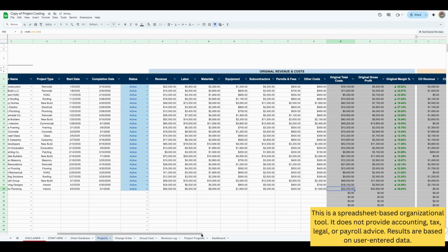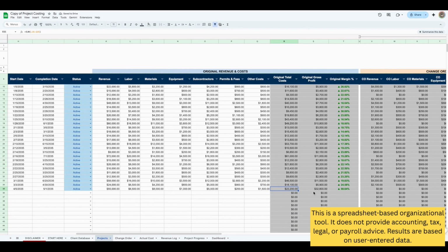So we can see here the gray area automatically calculates this information. So you can see here the budgeted cost is 22,200. So let's add it up for you here. The gross profit is just the difference between the revenue that you expect to get versus the expenses related to this project that you expect to pay out. So the difference between the revenue and expense is 32,800, and your margin is about 59.64, which is pretty good.